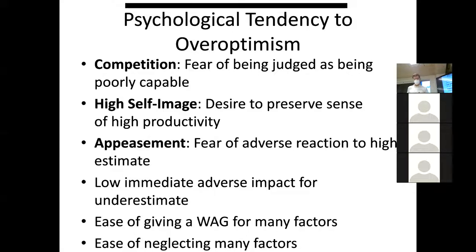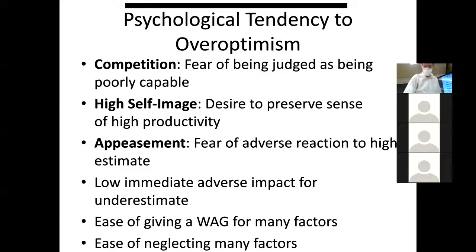There's the fear, at an individual level, of being judged as less capable. Many developers think: 'I don't want my peers to think I'm a lousy developer — surely I can do this in three weeks. I've seen others produce apps in three weeks.' You talk yourself into giving too optimistic an estimate. Sometimes people want to believe they're really capable, so they give an estimate that's too low. And sometimes there's external pressure, from customers or above, combined with the reward of getting the job without seeing the cost immediately.